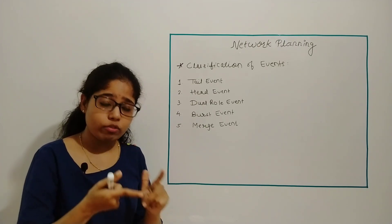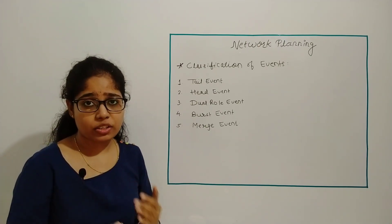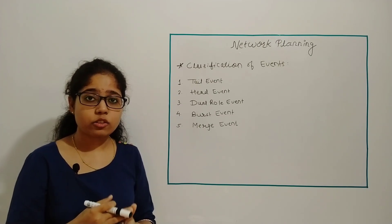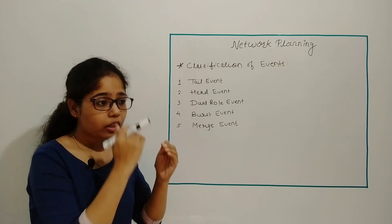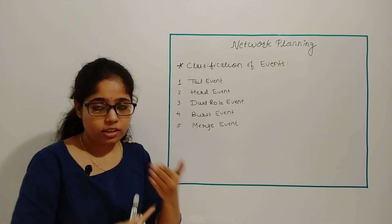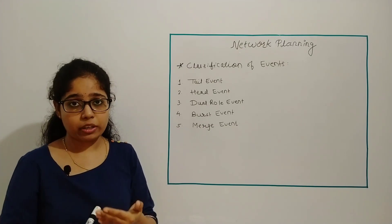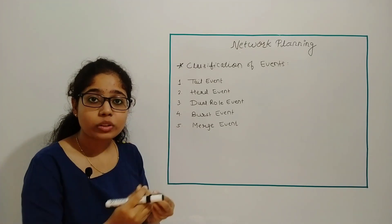Suppose on a construction site, your first activity is brick work. After completion of brick work only you will start plastering, then plumbing. So in this way you should know the activities and their sequence.